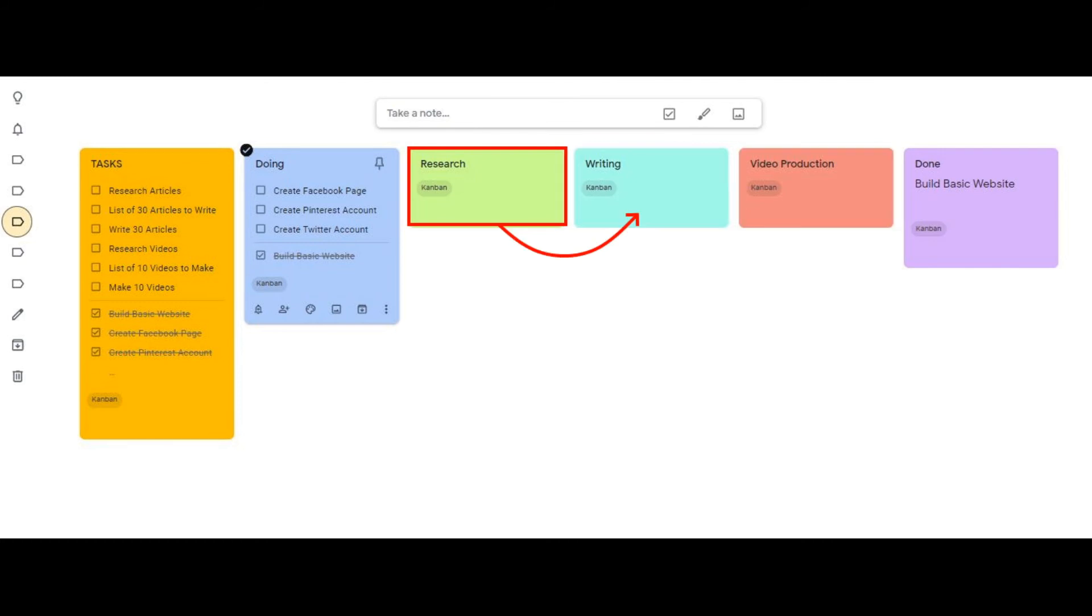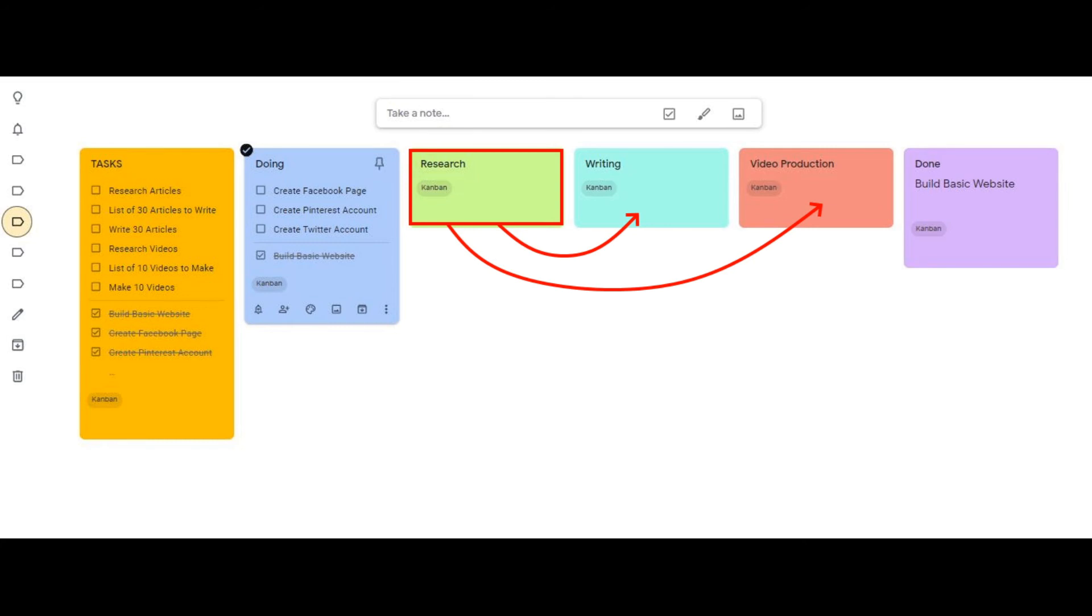You do research for articles and then you write them, and then you research for videos and you produce the videos. The research happens before writing and video production in this project. Also, you don't put an item in a box until it's time to start working on it. The foundation of this system in production is that moving an item to a box is a trigger.